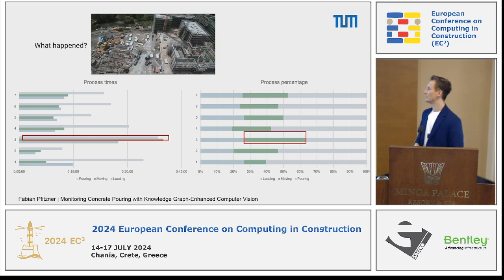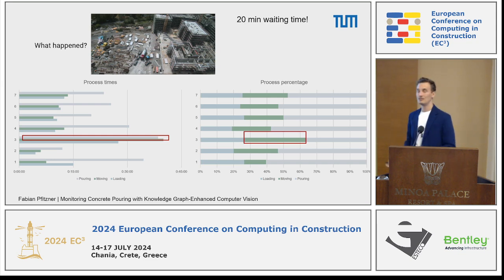We'll see that the concrete mixer departs from the construction site, but the process is still ongoing. And it takes time. Somehow they were waiting for the next concrete mixer to arrive. In total, they were waiting for 20 minutes. 20 minutes doesn't seem like a lot, but remember, all of the resources are occupied, the crane cannot be used. The entire construction site was stopped in this case. And this is exactly why we are losing money and time on some construction sites.